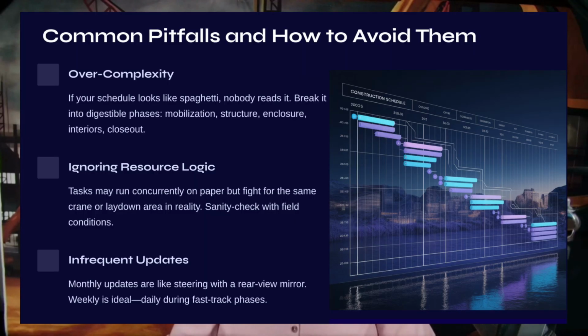Another mistake is forgetting resource logic. You might have two tasks that can run concurrently on paper, but in the field, they're fighting for the same crane or laydown area. The computer doesn't know that, but you do. Always sanity check your logic with field conditions.